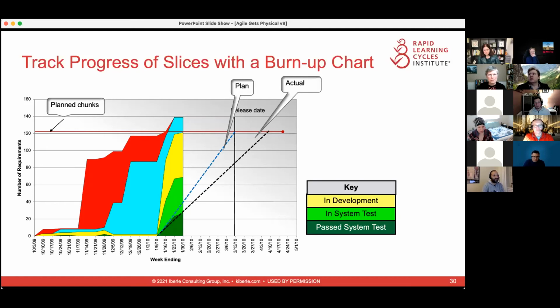And what I found over time working with these cumulative flow diagrams was that it took 3 or 4 weeks to accumulate enough data to get a good extrapolation. And then after that, if you had 3 or 4 weeks in a row showing the same pattern, that was probably going to be the pattern until some process change was made. And that took a little while to convince people that if you see that happening, it's probably going to stay on that line until you do something different. So if you don't like that line, you've got to think about what you do that's different.